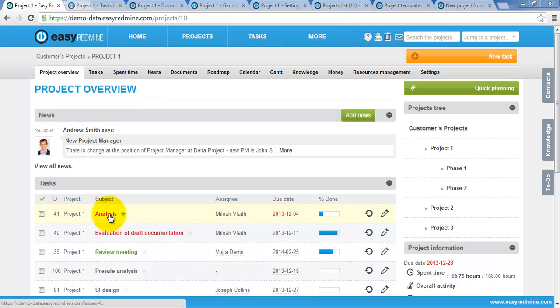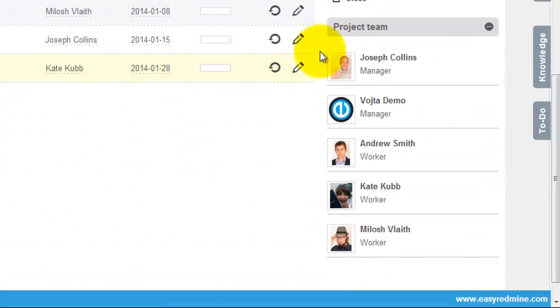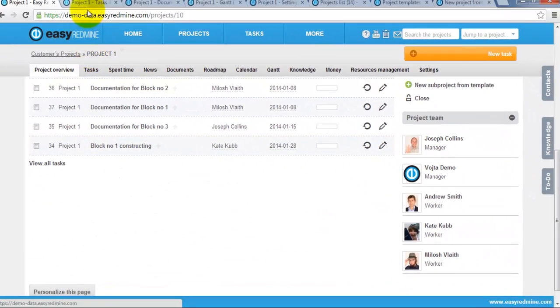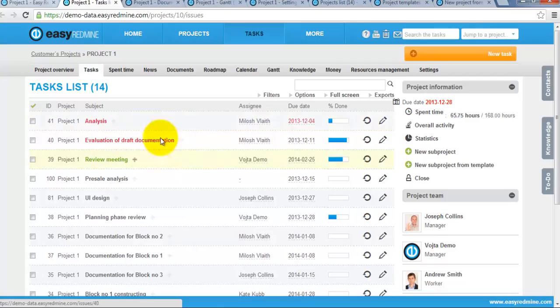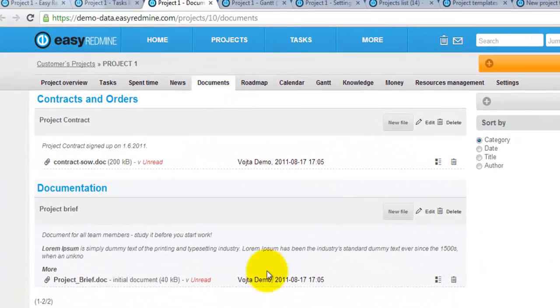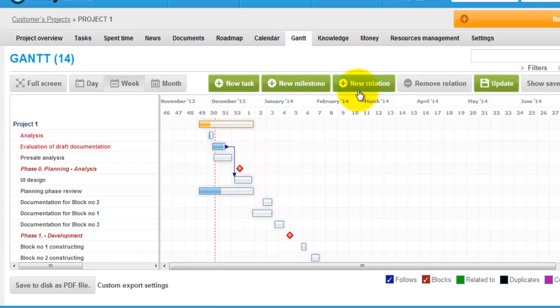Any existing project within Easy Redmine with customized project overview page, with the project team, with created tasks, with created documentation and even with the Gantt chart can be stored as a template.